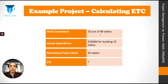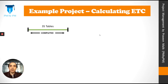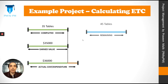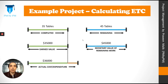Let's go back to our example project. At the end of day 3, 35 out of 80 tables were built, and the cost of building these tables was $36,000. 45 tables were still to be built, and we have to estimate the cost of these remaining tables. At the end of day 3, the earned value was $35,000, but it actually cost $36,000 — a small variation. We should have spent $35,000 to build 35 tables as per our original estimates, but we actually spent $36,000.